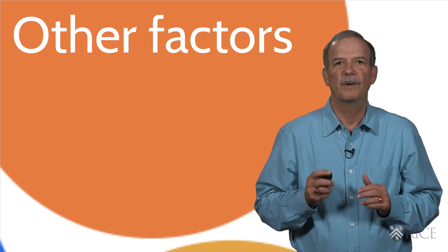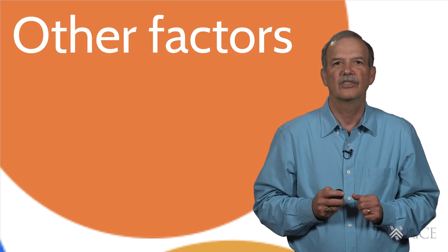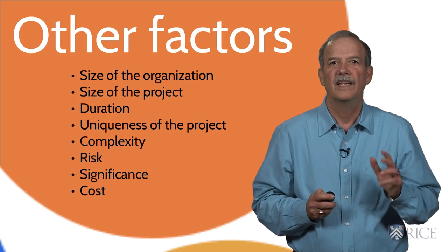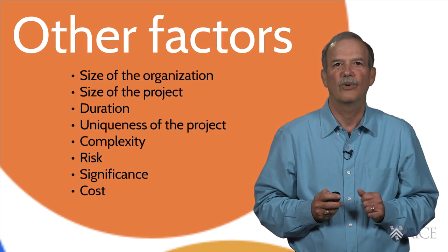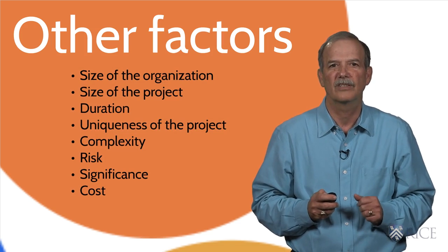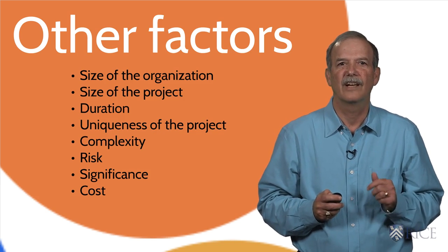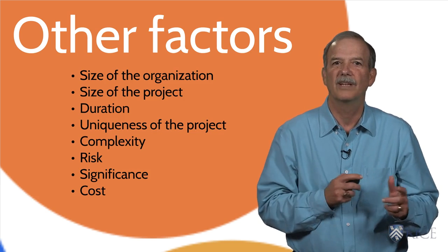What are some of the special factors that may influence your selection of a project organization style? Each of these factors can have a major influence on what project organization style is used on a project. For instance, if the organization does not have a lot of resources, then it's not likely to use a project-based organization.